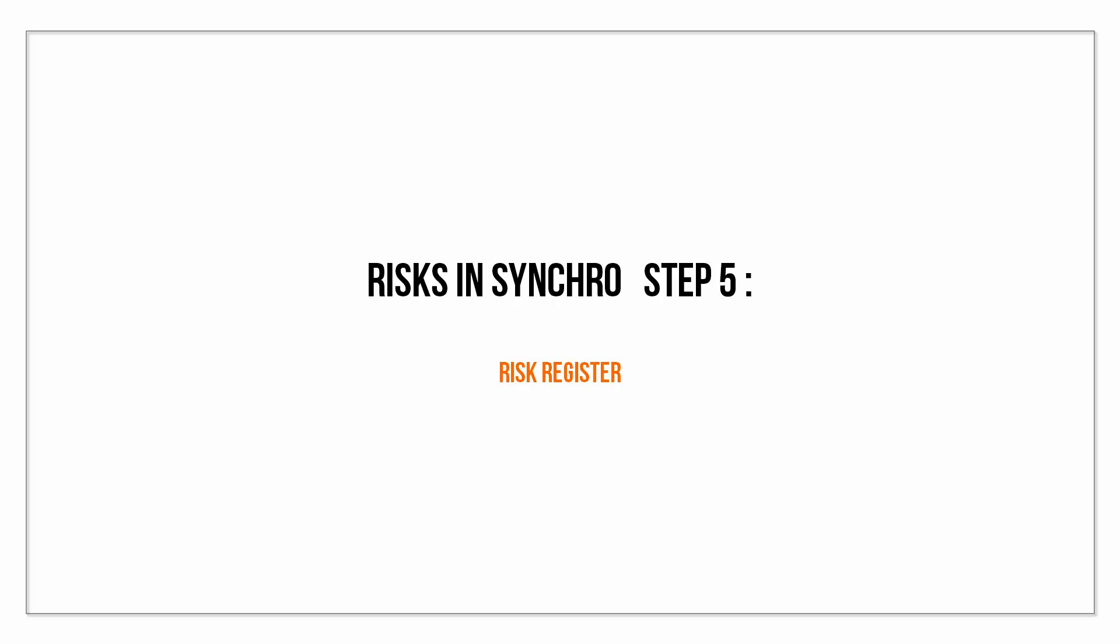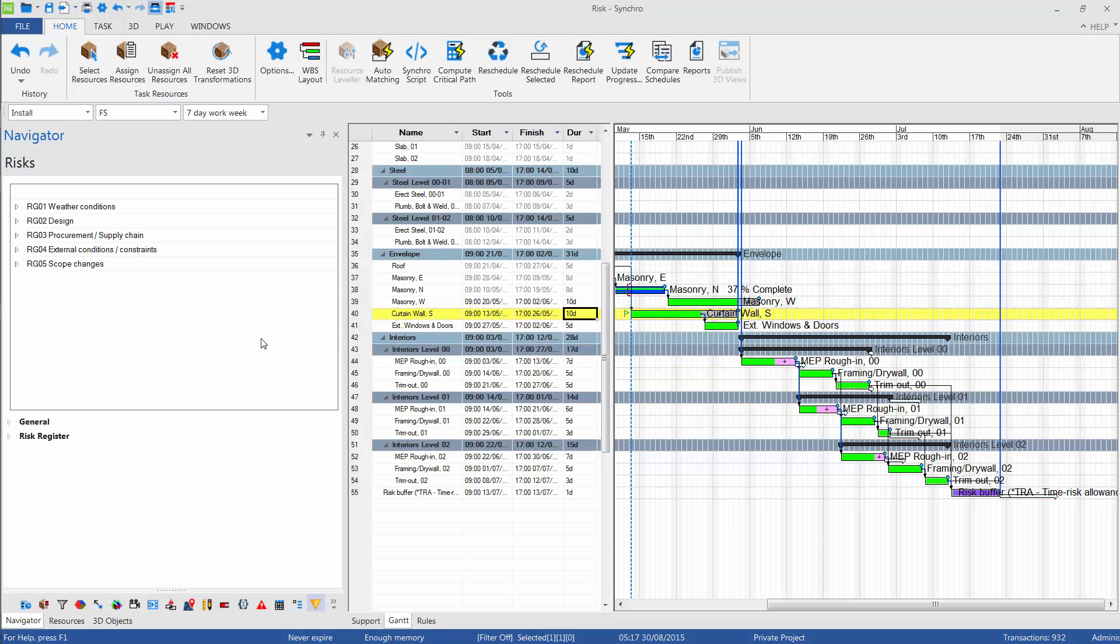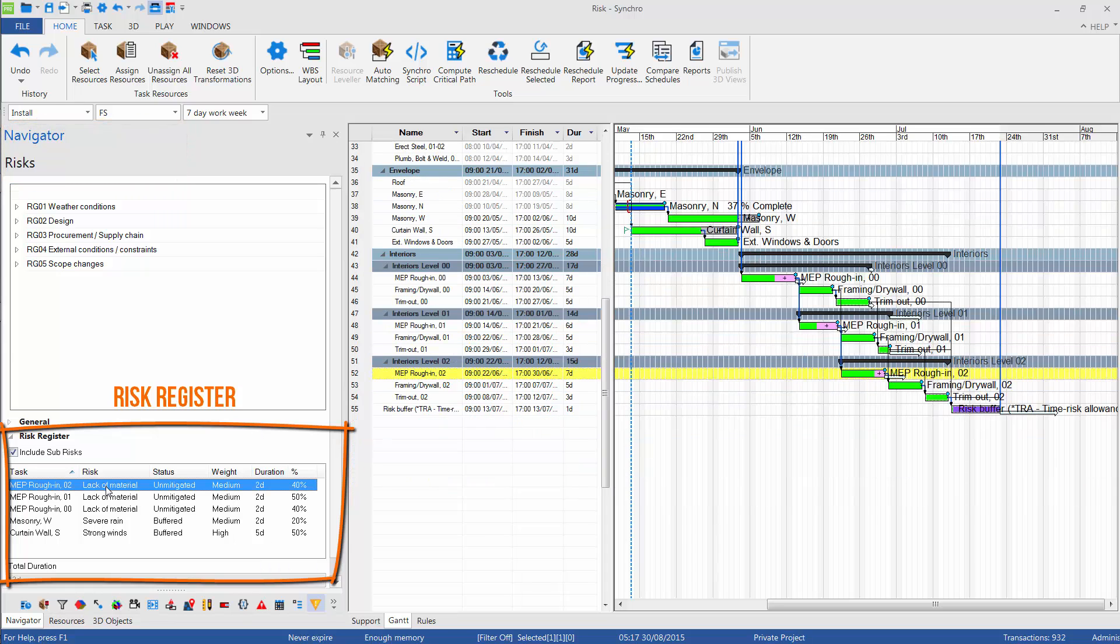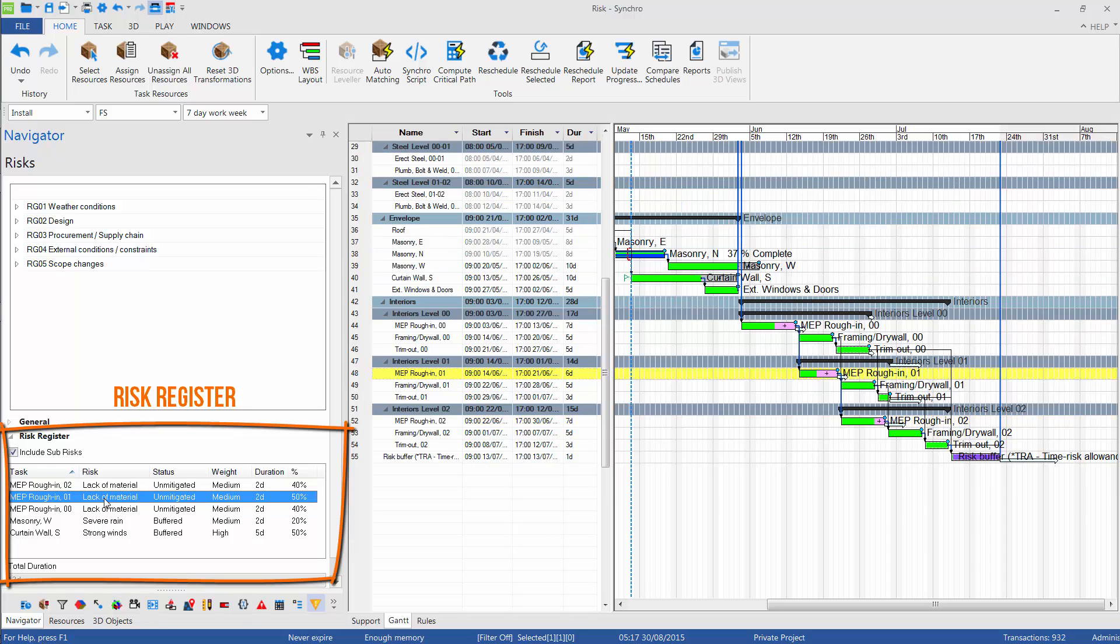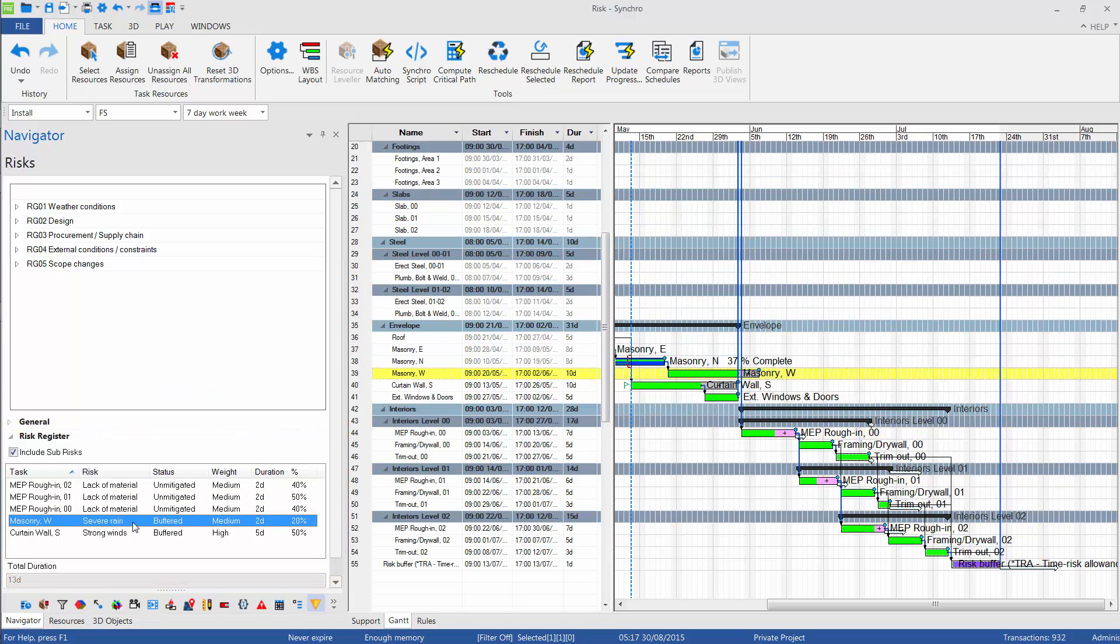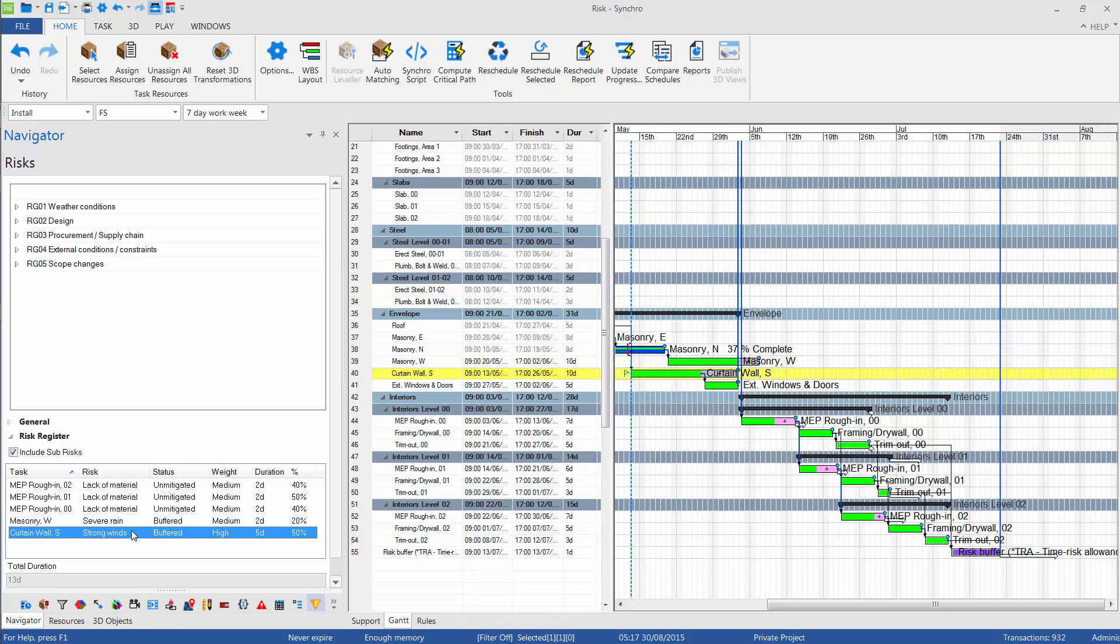Risk register is another way to find all the risks assigned to tasks in our schedule. We can find risk register on the Risk tab in Navigator window. Here we can find a list of identified risks and selecting them will automatically guide us to the associated tasks.